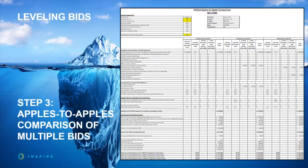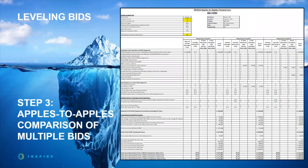Maybe it's the right type of startup processes, commissioning, training, spare parts, and SOPs associated with mechanical part failures. Is the air-cooled condenser going to run at negative 40 in the Alberta winter or 120 degrees Fahrenheit in the California desert summer? The list is long, detailed, and honestly pretty dull unless you're an HVACD nerd like us. But every one of these items is imperative for your facility to operate in a way that allows your plants to thrive and your business to be profitable. If all three of those plates — material bids, installation bids, and design team coordination — are not spinning in the same rhythm, you are sure to encounter unforeseen costs, schedule delays, or both.